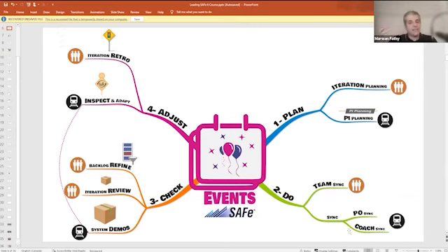They have this weekly sync at the ART level. The sync discusses many things, one of them being: what is our PI roadmap? What are the coming two or three PIs, what will we be working on in terms of features? So it's not a surprise. Given that, it's part of the discussion during the backlog refinement session. They do tackle the features that they will be facing in the coming PI.